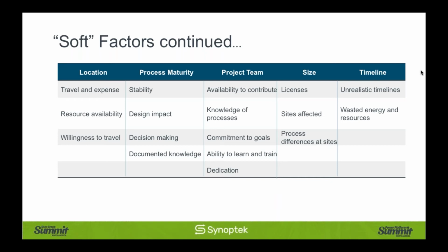I have seen these in the business, and they are real depending on the partner that you choose. But in most cases, your high rate is going to be around $250, $260. Your mid-range hourly rate is going to be approximately 195, around that figure, and your low rate is going to be somewhere around 160, 165. Of course, this could vary, but generally speaking, these are what you're looking at.